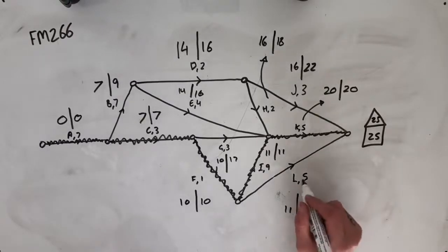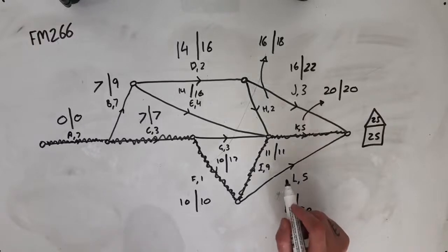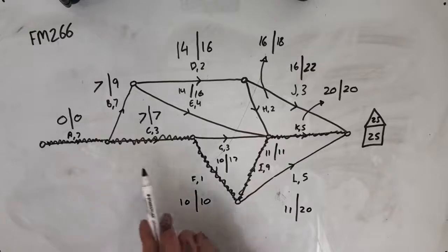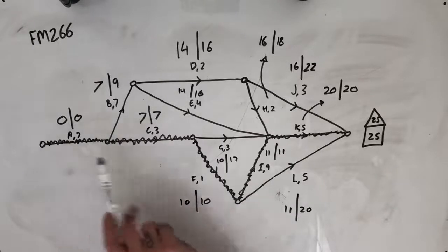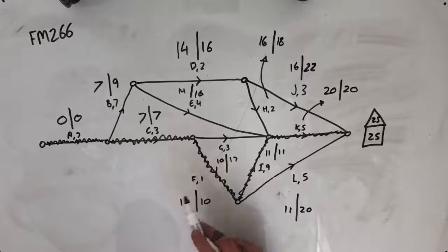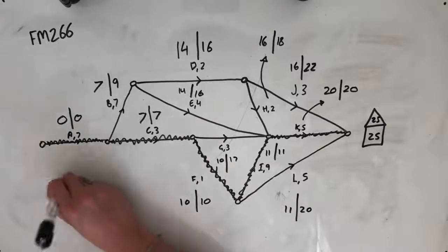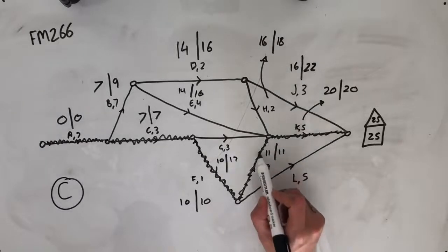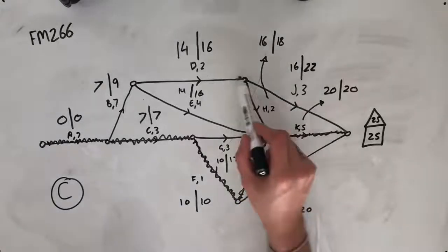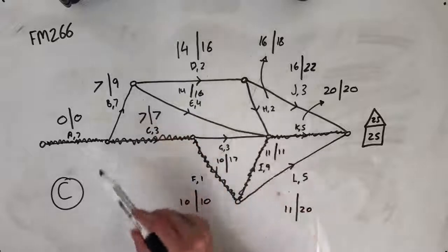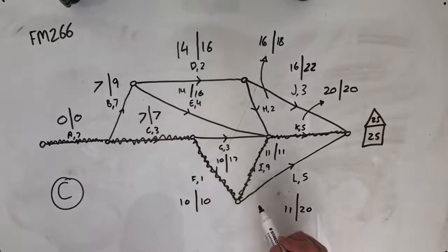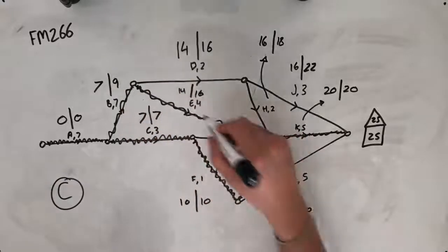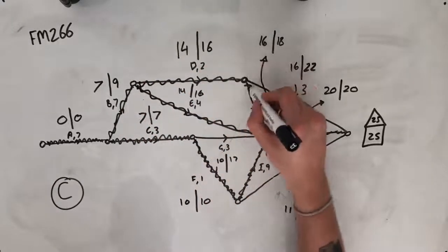So when we're looking through our options, we're looking to probably reduce our current critical path by 2 days, anywhere beyond A, and we're given that option in option C, which says that we have the option to reduce I by 2 days. So if we were to reduce I by 2 days, the 2 days worth of float time along each of these other two potential paths would catch up, and we would end up having 3 critical paths in this form along here.